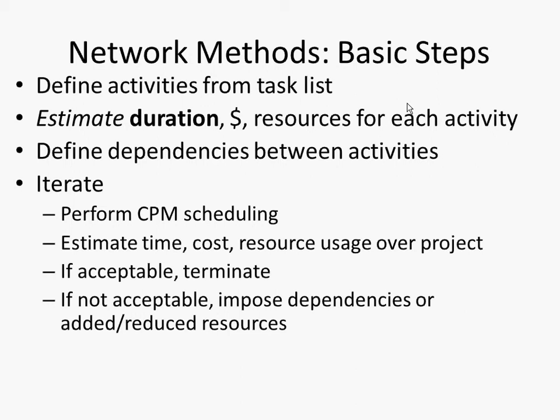Okay? And then you define the dependencies between the activities. What depends on what? When I used to give this lecture in much more detail, I would have talked about several types of dependencies. Start to start, start to finish, and finish to start. In this case, when we talk about finish to start, A must finish before B starts. That's the most common.